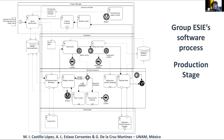After we produce a high-fidelity prototype, the production stage focuses on iteratively growing this minimal product into its final version. From the last design review, tasks are prioritized for a week of development, and test or acceptance conditions are redefined for each development task as necessary. The development process considers four types of exceptional tasks. The first are limits on expertise from developers who are often undergraduate students — assistance and training is provided if such an exception occurs. The second is limitations on tools, for example a feature limited by a selected library or runtime environment. The third is limitations in the design — when a tool presents limitations, the design is revisited.